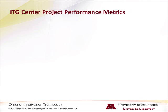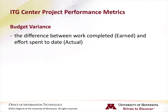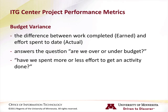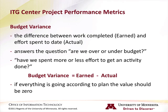There are 5 additional metrics that show the current state of a project at a given point in time. Budget variance is the difference between work completed (earned) and the effort spent to date (actuals, also known as burned). It answers the question: are we over or under budget? In this case, budget refers to effort, not cost — have we spent more or less effort to get an activity done? The calculation for budget variance is earned minus actuals. If everything is going according to plan, the value should be 0.